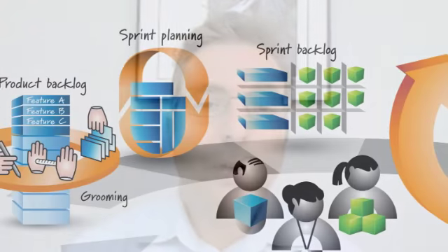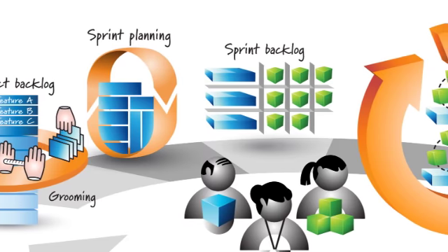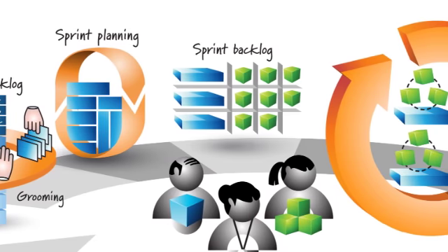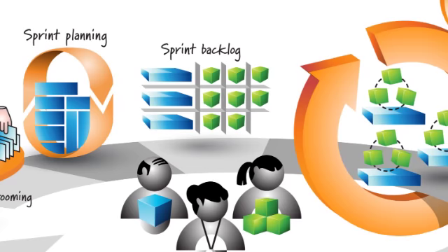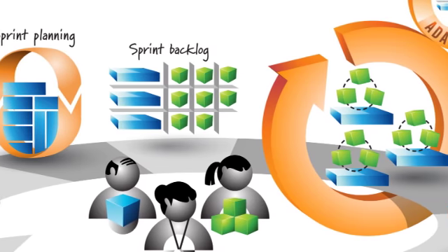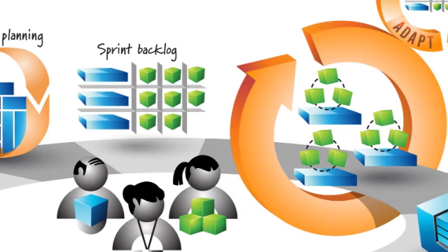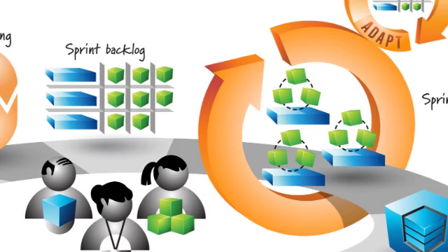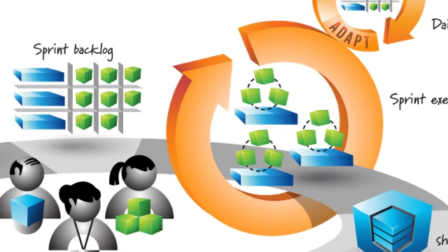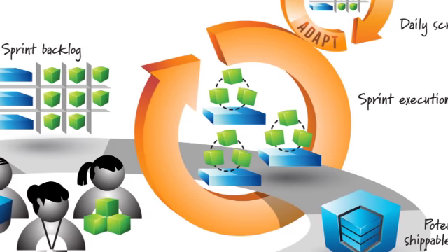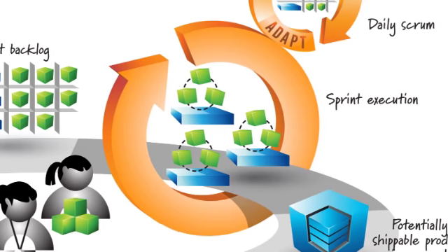So the development team pulls that together, and by using it, they acquire confidence. Now, you also notice that on the gray looping arrow, there's a darker shadowing underneath sprint planning. That represents approximately how much time we would spend doing this activity. So, for example, on a 2-week-long sprint, a 10-day-long sprint, sprint planning might occupy approximately half a day.